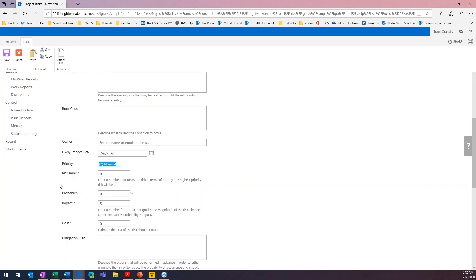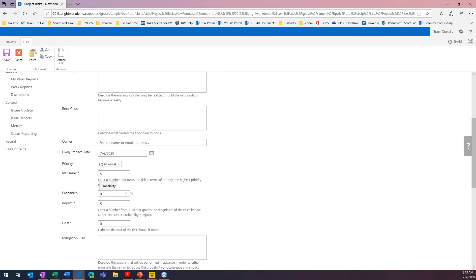So, these couple columns here are going to give us some better information about what our risk is going to do if something does happen or what the probability of that is. First, we can rank this. So, let's say I have 10 risks at the moment. Maybe this is just, in the priority of things, number five in that list. The next thing is, what is the probability that this risk is actually going to happen? I'm going to say, right now, not 100% sure. We're going to make that at 50%.